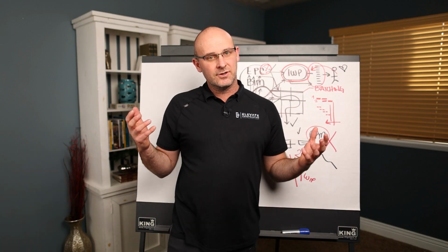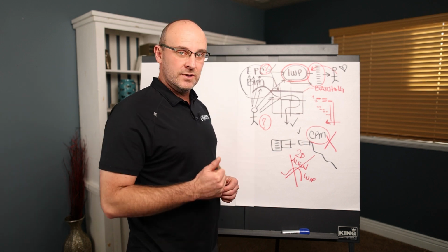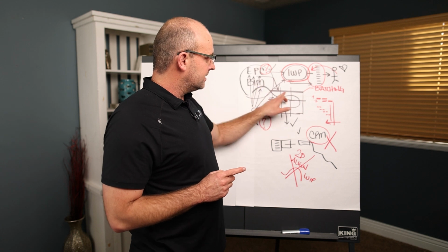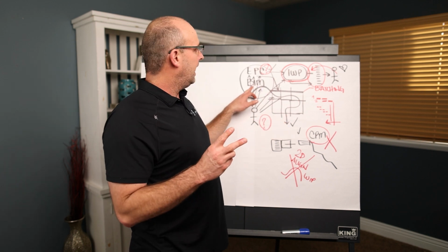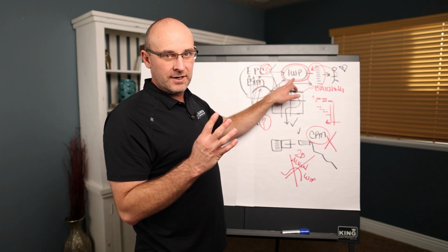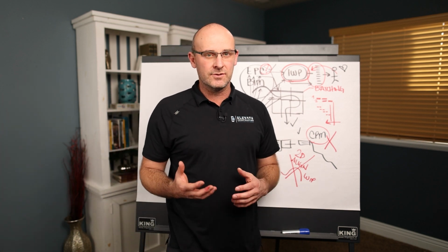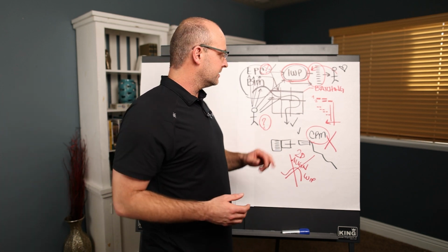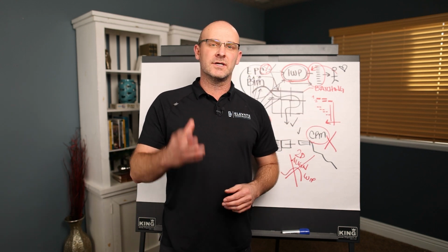So if somebody says, hey, let's go ahead and use advanced work packaging, that's great. Here are some things that you can actually implement with some success. First and foremost, absolutely identify a path of construction. Absolutely implement BIM. Absolutely prepare the work packages. Absolutely make sure that the foremen are preparing their installation work packages. And absolutely align it with TACT. And if you do those things, you will be better prepared for work in the field and you'll have a beautiful experience. But watch out for these key problems here and make it work for your project the right way.